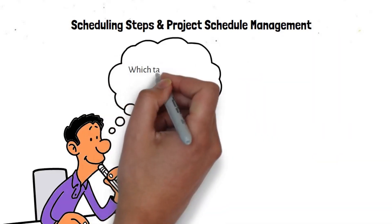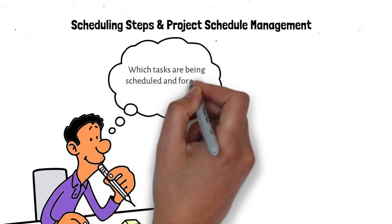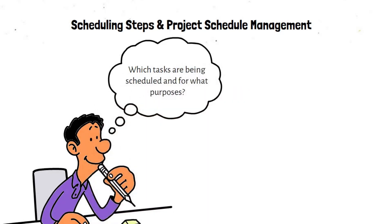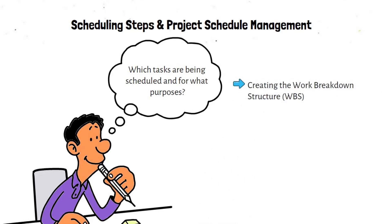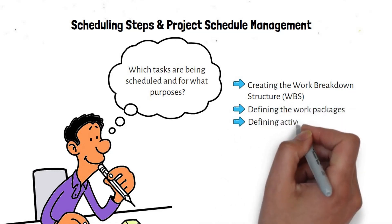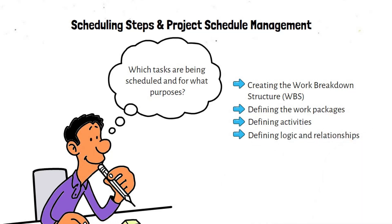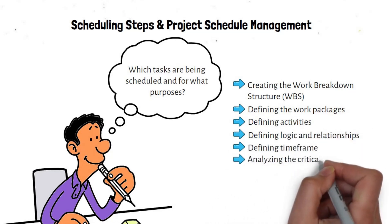While creating a project schedule, the scheduler must ask: which tasks are being scheduled and for what purposes? The answer to this question requires expert knowledge and experience. Many experts have their opinions on what is required to create a serviceable schedule. Basically, project scheduling follows these steps: creating the work breakdown structure (WBS), defining the work packages, defining activities, defining logic and relationships, defining the time frame, and analyzing the critical path.